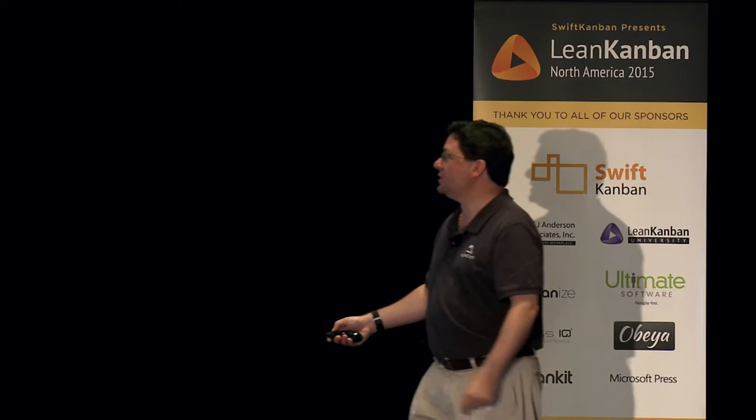And this is what kills projects. This is what gets you in trouble. There's a lot of volume in this tail way out here, and there's a lot of likelihood that a project is going to end up out there. A 10% risk, a 20% risk.